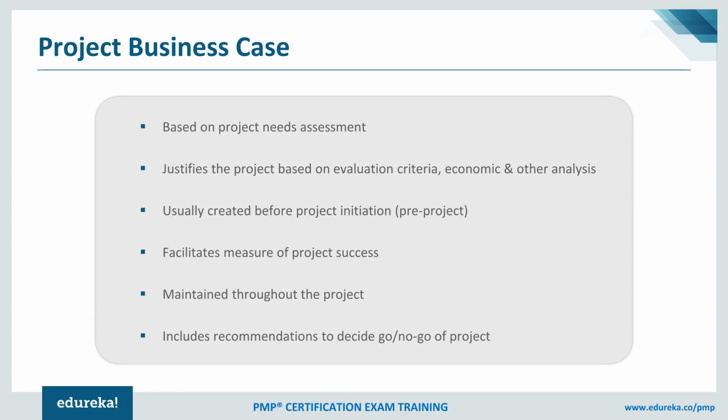So I can see here that Savita is having this question: who prepares the project charter? This is a good question, by the way, because I have seen sometimes this question is also there in the examination and people get confused. Sometimes I've seen people writing that the project manager is the one who will create a project charter. But don't forget that the project manager is given a project charter. That means somebody else has prepared it. So in this case, it's going to be the sponsor of the project who will be creating the project charter and handing it over to the project manager, which authorizes the project manager to kickstart the project.